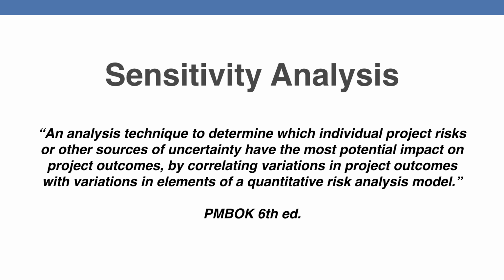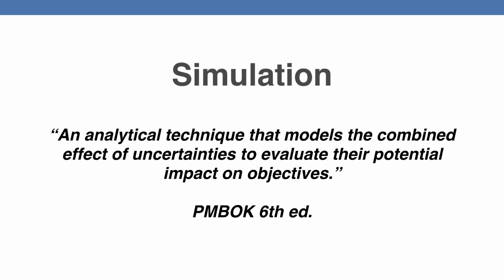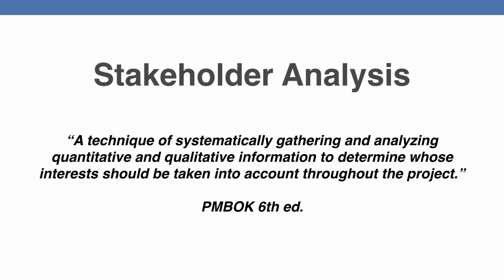Sensitivity analysis is an analysis technique to determine which individual project risk or other sources of uncertainty have the most potential impact on your project outcomes. This is done by correlating variations in the project outcomes with variations in elements of the quantitative risk analysis model. A simulation is an analytical technique that models the combined effect of uncertainties to evaluate their potential impact on objectives.